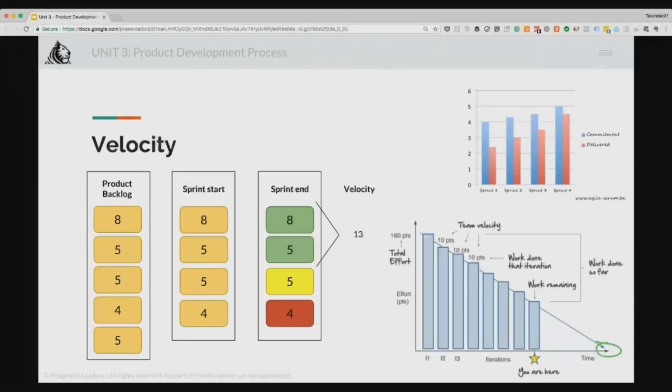And in the downstream, things will obviously slow down, right? Because things are just not flowing properly, correct? And that shows the inefficiency in the system, right? So when velocity is erratic over a long period of time, always revisit the team's estimation practices.